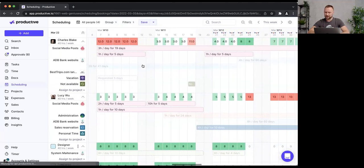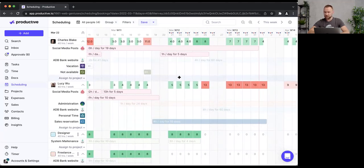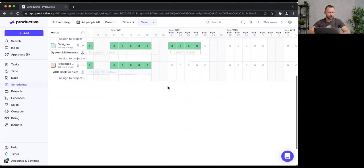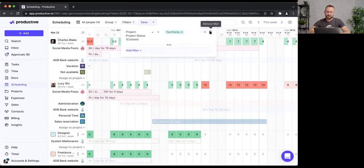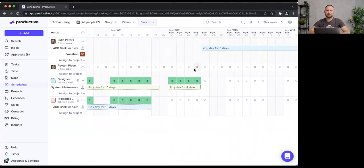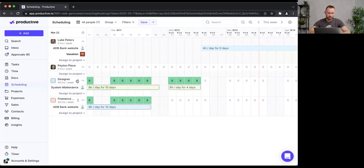Looking ahead, I notice some people may be overworked, so I might need to hire new people. You can plan for this in Scheduling using placeholders — virtual people that act like real team members. You can create bookings for them, add a cost rate and capacity, and build a cost matrix for the future.